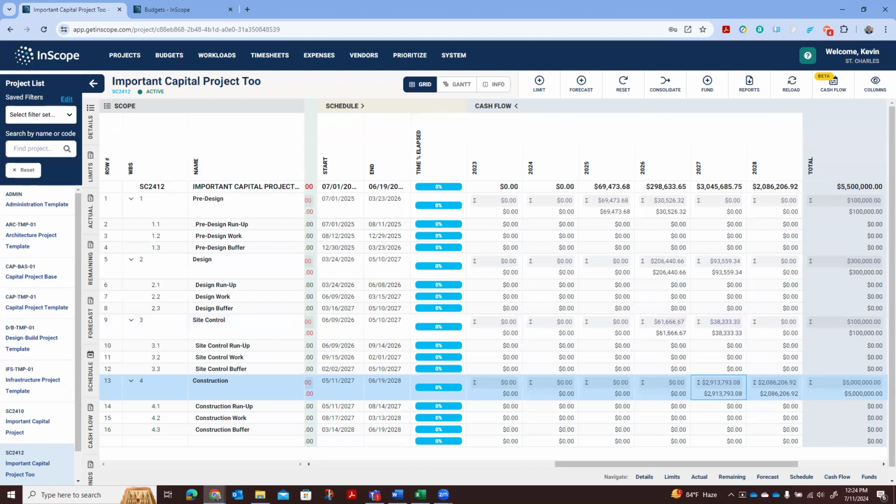Now, there's a friction point here, and the friction point comes in because imagine you have this $5 million contract. Well, our finance departments, God love them, how they typically look at it is, well, you got a $5 million contract, that's a $5 million encumbrance. And so they budget it all, right? That's the line: we're going to budget it all. Even though it's going to take me a while to expend those dollars, they're going to want to put that $5 million in the budget.